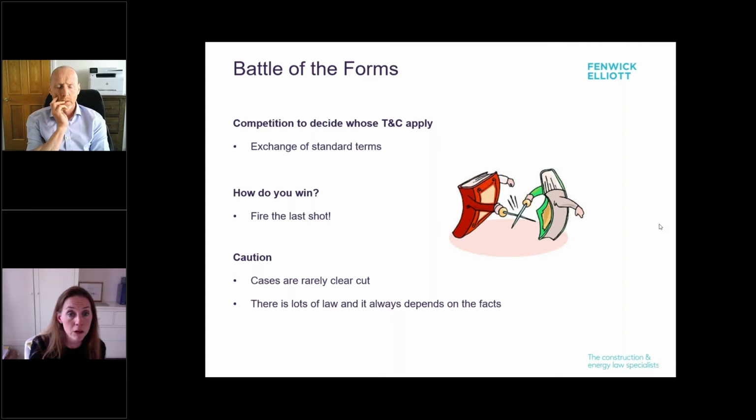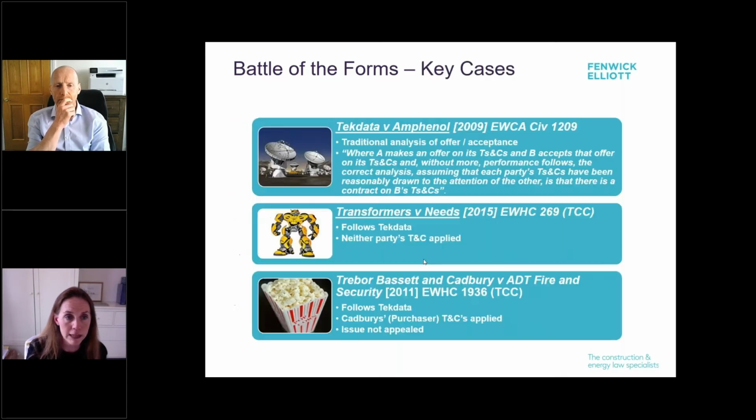How do you win? You have to fire the last shot. And what that means is the court will do the offer and acceptance analysis to determine when the contract was formed, and the winning terms will be those on the table at the point the contract is made. Fortunately, it's not always very clear cut. So let's have a look at 3 examples of cases dealing with Battle of the Forms scenarios.